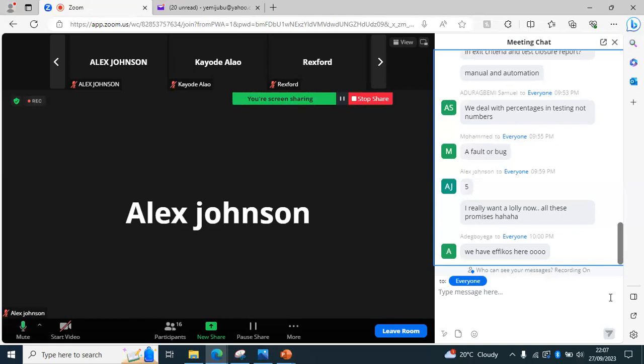In terms of what Rose asked initially, she asked how do you prioritize? You have been given a requirement. That's the reason I told you that in your requirement, there will be things stated for you to know that this is a must have. Must have means it is compulsory. This is a should have, either or. It's a nice to have. We can do without it.